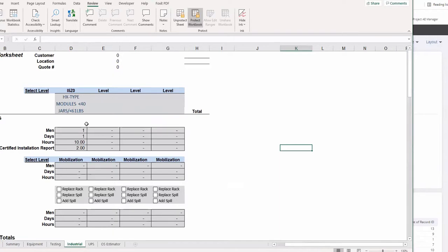It tells you where our zones end and begin. So for offshore, everything's always a zone 0 because the customer pays our helicopter ride to get out to the platform. And we go from within an hour or two's drive from our Mandeville office that we quote from. So zone 0 for anything offshore.